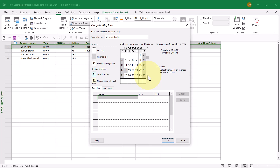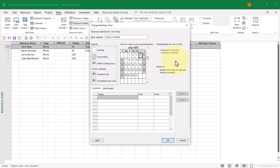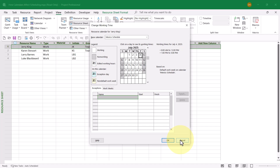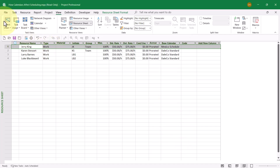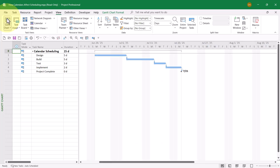If I scroll in the calendar grid to July 2025, notice that July 4th is listed as a working day for Jerry King — 8 a.m. to noon, 1 to 5 p.m. It's not a company holiday in Mexico, even though it is in the United States. I'll click Cancel to get out of these dialogs and go back to the Gantt chart view.